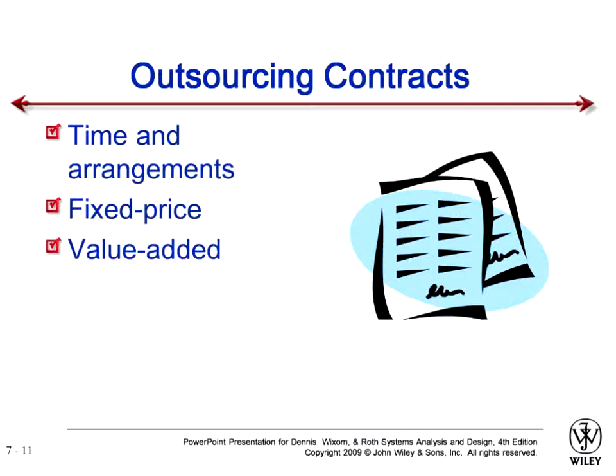The possible disadvantage of a time and arrangement contract is that you can have a very huge bill at the end of your project. If you ask someone to do it for you and charge as much as possible, take as much time as they can, they are going to take maximum time, and they are going to cost you very high. So their bill will be very high. This contract can be made, but sometimes you have to make it when both you and your company and that company don't know what is going to be done.